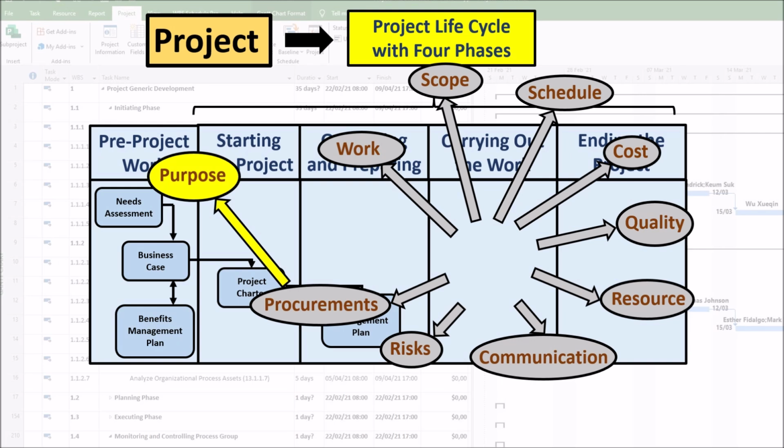Paying invoices. The quality of controls, including the independence and credibility of procurement audits, is critical to the reliability of the procurement system. Procurement control has a financial management component that involves monitoring payments to the supplier. This ensures that the payment terms set out in the contract are met and that payments are closely related to the work performed.